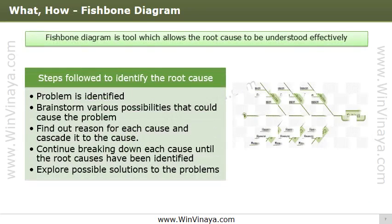Let's discuss the steps involved in creating and analyzing a fishbone diagram. The effect — usually the problem that needs to be resolved — is placed at the fish head. The causes of the effect are then laid out along the bones, and different reasons for each cause are cascaded along the branches, as shown in the figure. Step one: identify and clearly define the problem or effect to be analyzed.